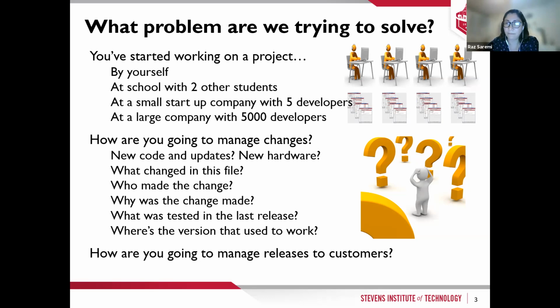We said that every time something changes, we may need to change the requirement and design for the entire system. So these changes that are based on agility, we need to manage them. We need to be able to track them back, right? So the second objective was traceability. I can trace every change back to know why I did that and who made that change.